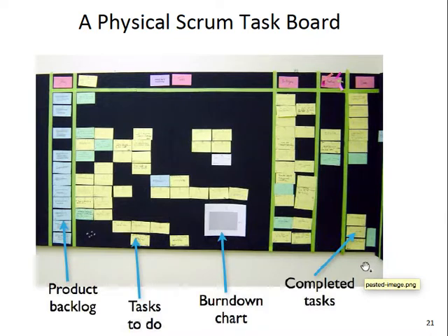This is another task board with more tasks, and there is this burn down chart someone printed onto it. It will show a line drawing downward. If it's driven from data you enter on a spreadsheet in Excel, it's actually quite easy for you to generate the new chart every day. So each day you have one more day of data, and you're closer to the bottom.